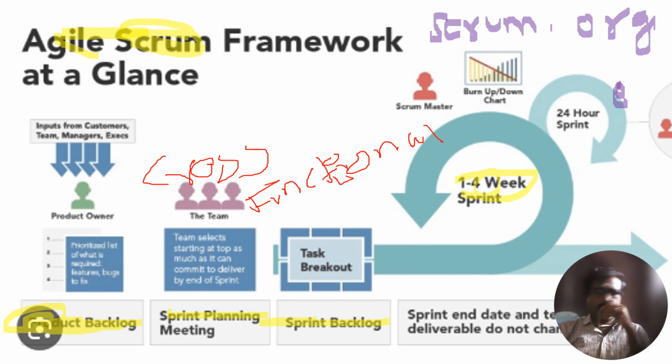And second thing, the release planning meeting, often used but not defined in Scrum. Release planning meeting is held for each release to decide prioritization of requirements in the product backlog, decide what should be included in each release, and put high level estimates against each item in the product backlog.